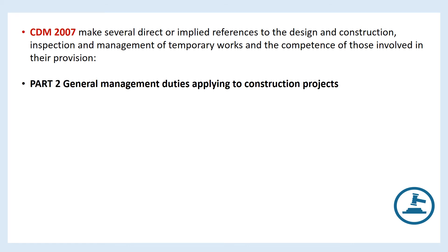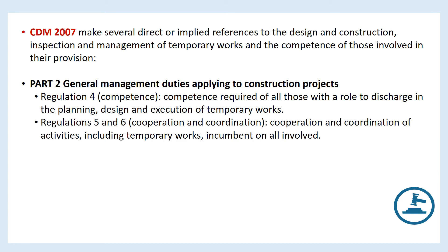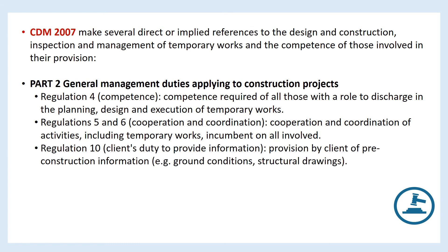Part 2 — General Management Duties Applying to Construction Projects: Regulation 4, Competence — competence is required of all those with a role to discharge in the planning, design and execution of temporary works. Regulations 5 and 6, Cooperation and Coordination — cooperation and coordination of activities, including temporary works, is incumbent on all involved.